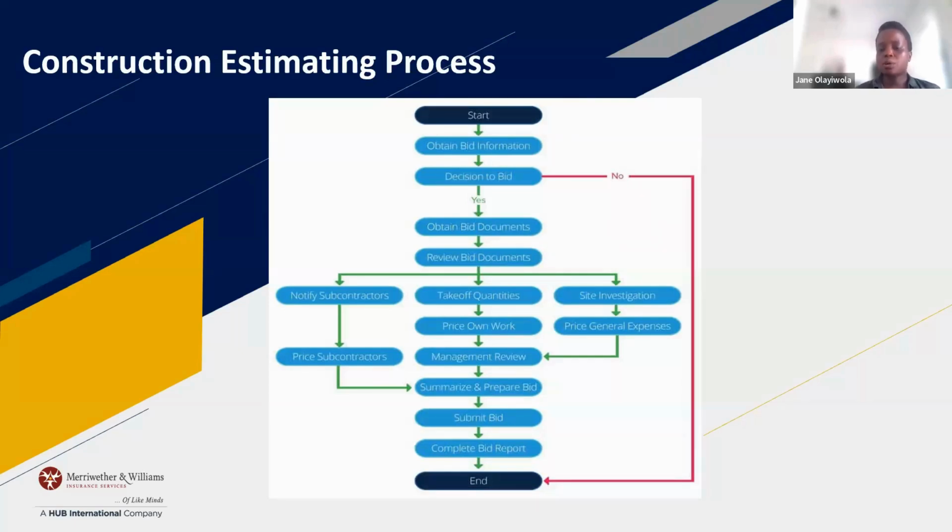I would put that together on a change order, and then you would reach out to the GC and say, look, we came across this condition. We didn't have any documents that notified us of this. There was no way we could have known. And this is only the amount that I provided because, as you can see in my notes and clarifications in the assumption sheet that I provided along with my original estimate, I had no idea this was going to happen. So I didn't carry anything for it. So Mr. GC or Mrs. GC, now I do have this change order for you. And then the negotiation starts, right?